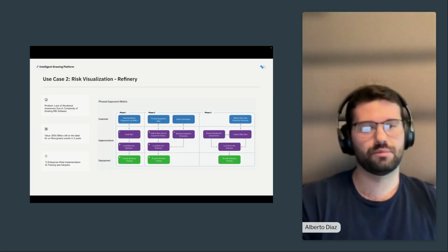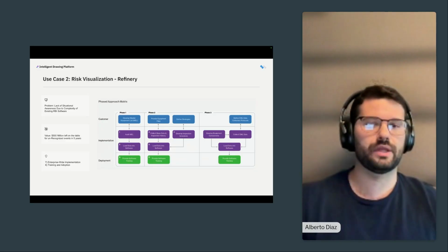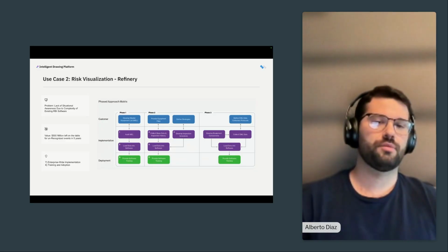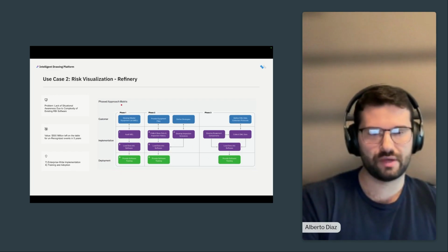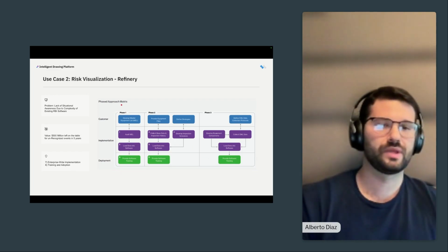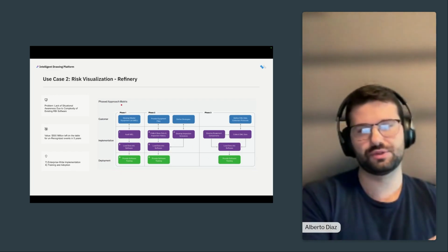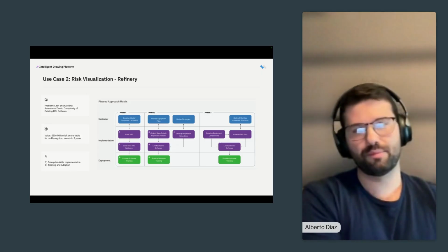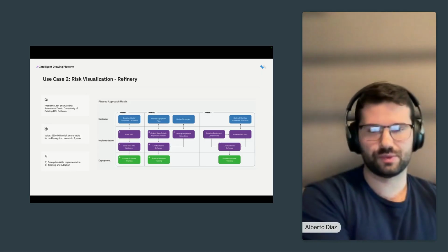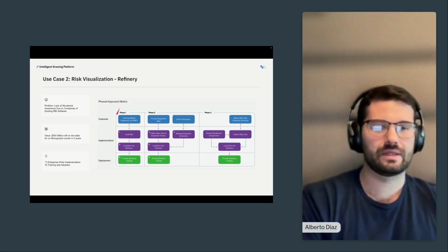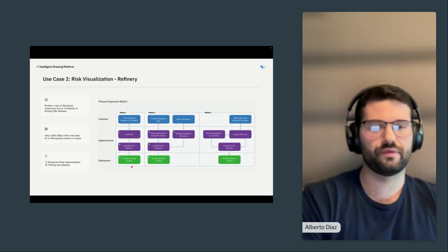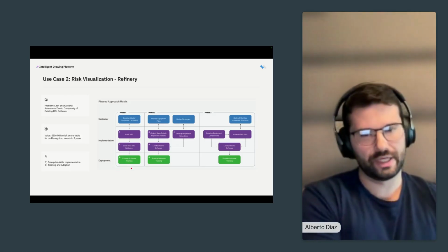But when we're looking at multiple sites, 5, 10, 20, or 30 facilities being deployed in parallel, it is better to approach everything from a phased point of view. In this first phase, we typically just go very high level. Let's import all of the assets as we see them on the registers, and cross reference with the PNIDs. And at the end of this first phase, we focus on an initial training.